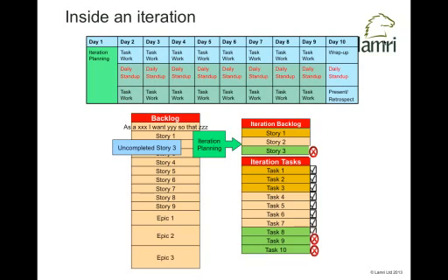You either work from previous experience, or if you've got a brand new team and a brand new environment, you guess at it and say, well, what's reasonable? And you'll get this wrong the first time. You'll overestimate. You'll put too much into the iteration and you won't deliver it. So what you do know is you've then got an idea for how much you can do in an iteration, so you can replan and reallocate stories to iterations to balance them out to more what you can actually achieve. In the next iteration, you'll get a lot closer, and probably by iteration 3 or 4, you'll be on the nail. You'll be by and large delivering what you commit to deliver each iteration, and that's called understanding your velocity and nailing your velocity, so you can then track that over time.